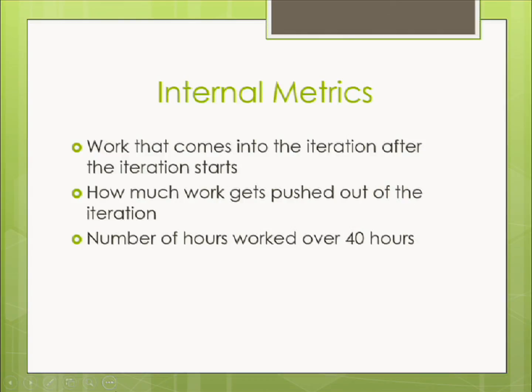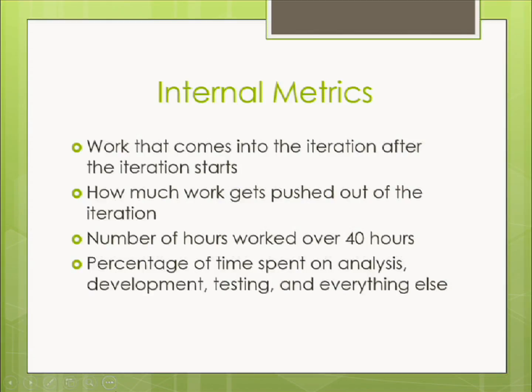All right. The slides will be online if you miss anything, since half of you are missing it now. All right, so I like to track what percentage of time we spend on analysis, development, testing, and everything else. So if we estimate this up front, like how much time we think we're going to spend on all this stuff, let's see what it actually was at the end to see how we can all get better at our estimating. So as an individual, you should be tracking this for yourself. But then at the team level, we should also be checking to see how this is working out.